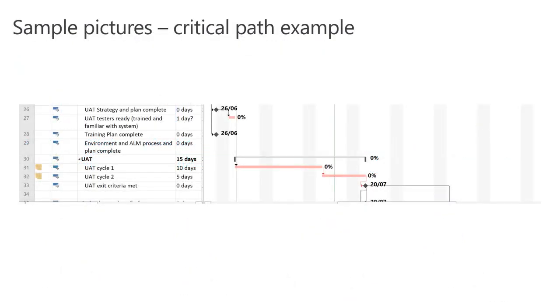Again, within the sprint plan, you don't have to use MS Project if you don't want to. If you're using something simpler like Excel or whatever, it's okay, as long as you have something that you can visualize and show people what is it that you're delivering within that sprint. These are the processes, these are the interdependencies, and this is the critical path, right?